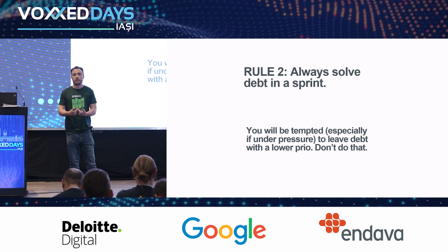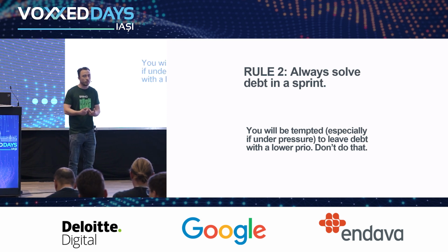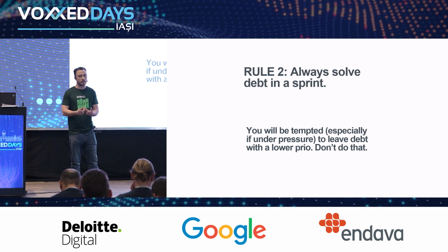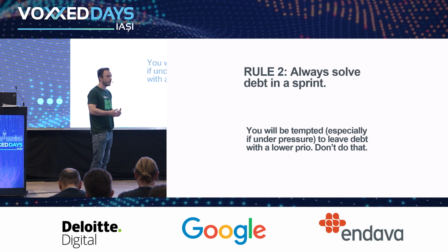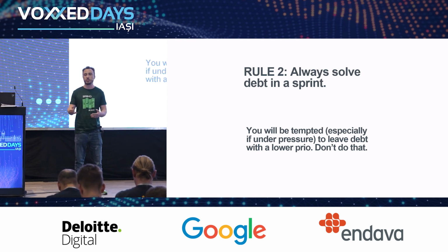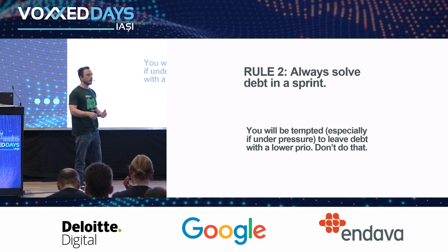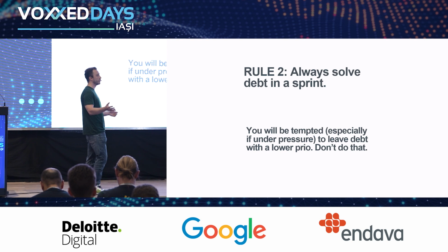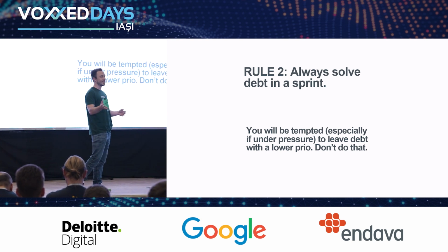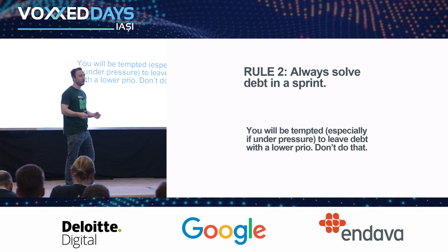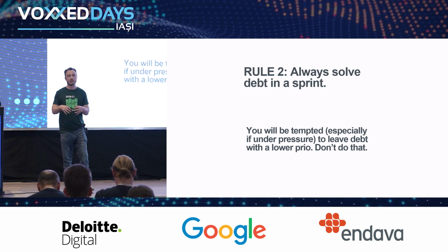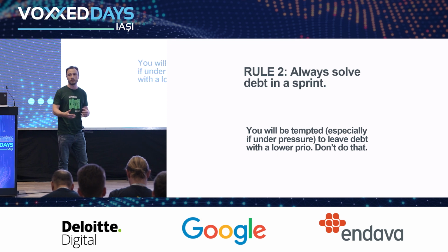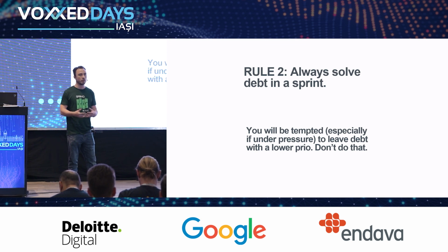So you always have to consider that technical debt exists, and that's something you need to address continuously from the beginning of your project. If you skip one sprint putting in technical debt, you might then create a habit and skip another sprint, and another sprint, and another sprint, like a strike. If you put it in every sprint, you will create a good habit of always solving something messy. Don't forget, you have to upgrade your versions.